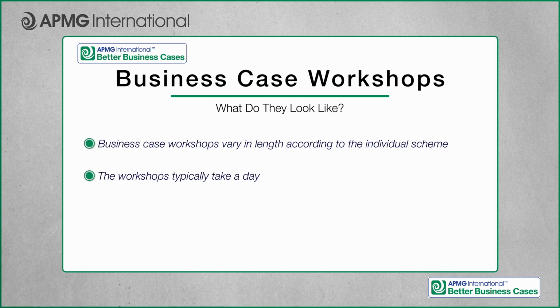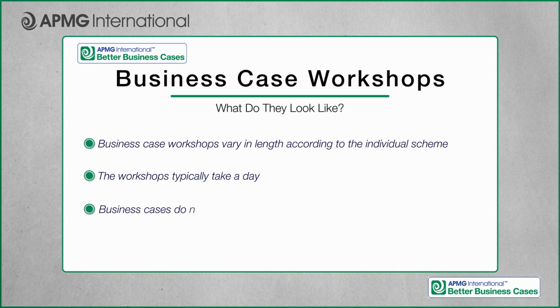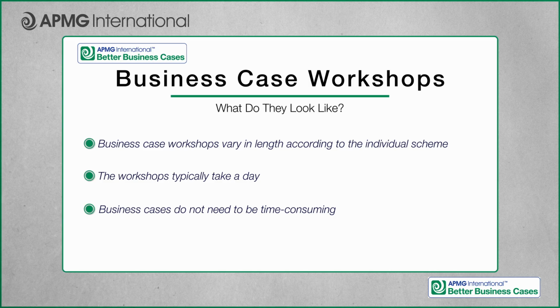Now, look, people say business cases are too slow, too expensive, too time-consuming. They don't need to be. I have actually, for some major schemes, delivered the business case within weeks. In a single week, with the relevant stakeholders, I bottomed out the case for change in workshop 1. I've done that in the morning. I bottomed out the preferred option using the options framework filter, scoped and planned that in an afternoon. The resource, the time, has actually gone into somebody writing up the business case.